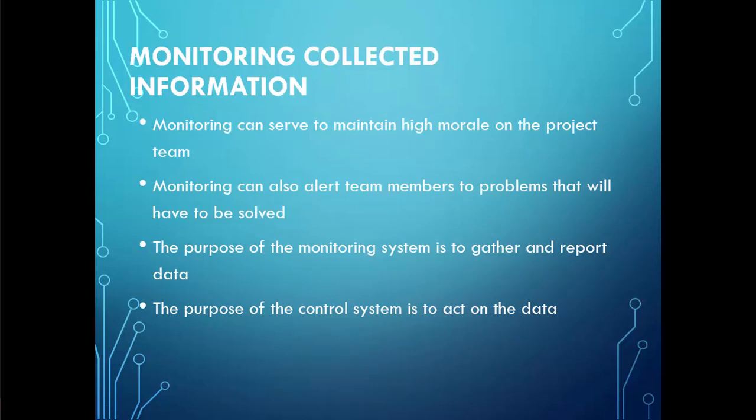Monitoring collected information can serve in maintaining high morale on the project team. In addition, significant differences from planned should be highlighted or flagged so that they cannot be overlooked by the controller. Flagged issues and problems will trigger alerts associated with an action plan that should be implemented as soon as these issues happen. The problem, the reaction taken, and the outcome will be documented and reported to upper management. In addition, it will be archived as a reference for future projects.